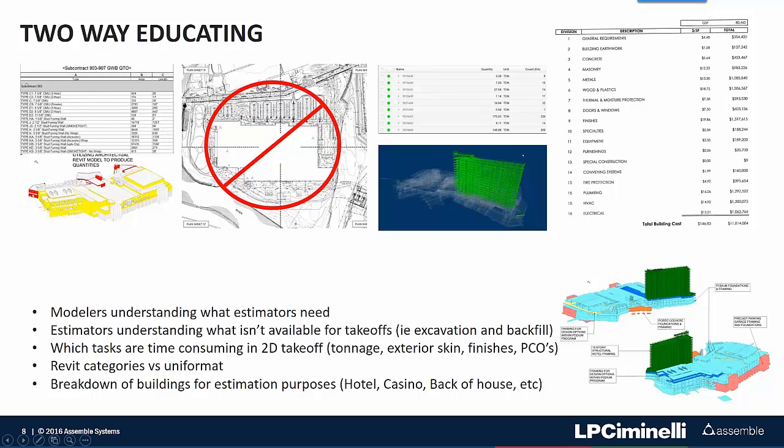And I'm breaking down the building for estimation purposes, and I'll have David talk a little bit about some of the pictures that you're seeing on the screen. Thanks, Melinda. As I'm sure a lot of us are familiar with dealing with estimators, we look for shell core, exterior skin, volume, and BGSF are some typical things we initially look at when we're trying to take a job off, especially at the schematic level and all the way up through the CD level of documentation.